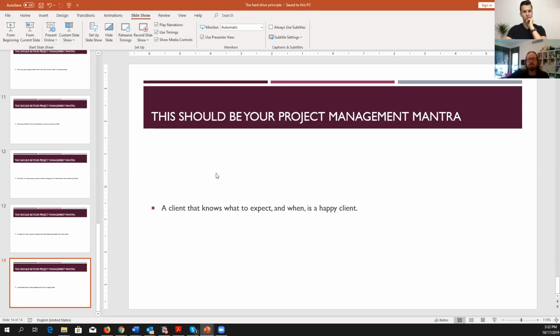As we mentioned before, a client that knows what to expect and when to expect it is a happy client. And predictability in life, I'll add it to my previous statement about borders. Predictability makes people happy. When they know when to expect that thing, they can plan. They're not feeling stuck. When a client doesn't know when a certain project will be ready, he is not able to initiate other projects related to it or to launch campaigns, depending on the field that the project is associated with, meaning he's stuck. And when he's stuck, he's not happy.